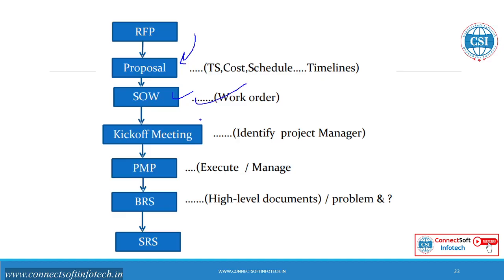Once the work order is signed off, they start a meeting, the kick-off meeting, to identify the project manager. Once the project manager is identified, the project manager creates the plans, known as the PMP, project management plan, for execution and managing everything. The first documentation created is the BRS, and the actual requirement gathering starts from here. The BRS contains the high level requirements in high level documents.